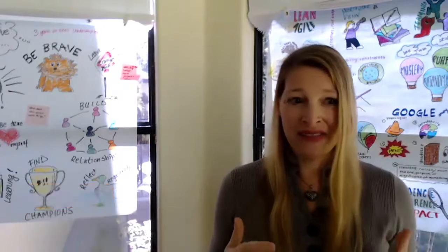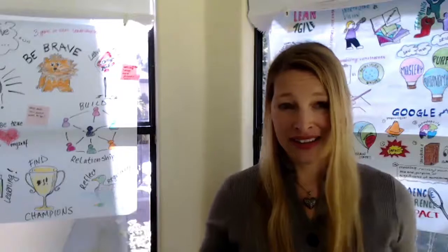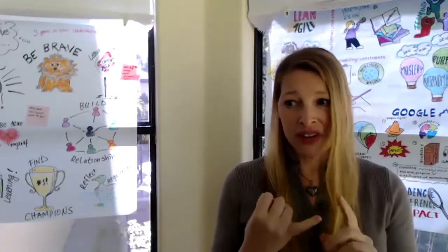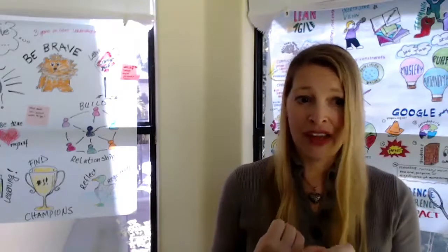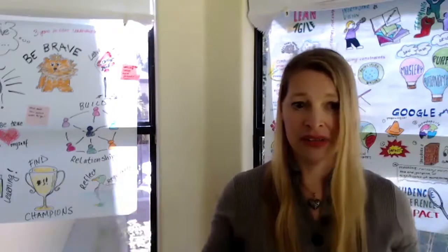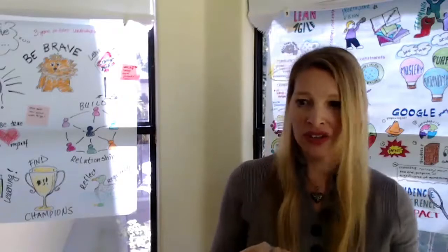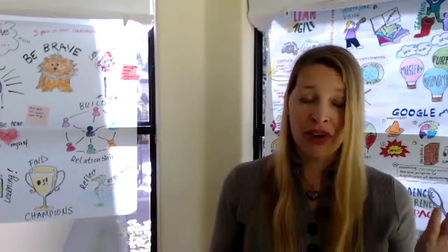Oh, you have hit upon yet another topic that I love to talk about. First of all, I've been in lots and lots of organizations where the main impediments are actually not at the team level and they are outside the team's control. So I would say, first of all, you have to have a protocol for what to do with those items. If you haven't even set up a protocol for that, then you're kind of dead in the water because teams aren't going to know what to do. So I've had teams have wiki pages or Kanban boards. So the first step would be to decide how to handle them across teams.